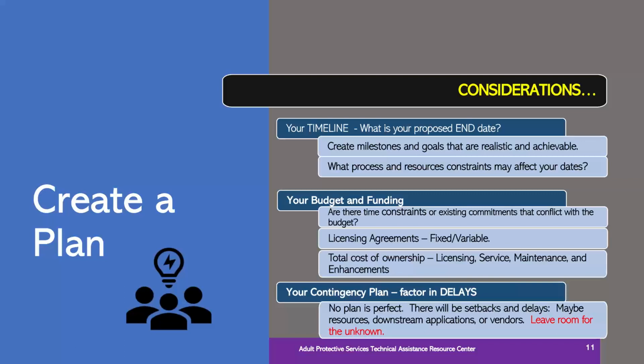So we have milestones. A milestone is a marker in your timeline that accents a certain goal. So these should be achievable and realistic. In the same instance, tasks should be timed and adjusted to meet your need. So sometimes you have high volume seasons of work and your resources are constrained, or you'll have high vacation time or holiday time. That should be considered when you are actually putting together your timeline or your project.